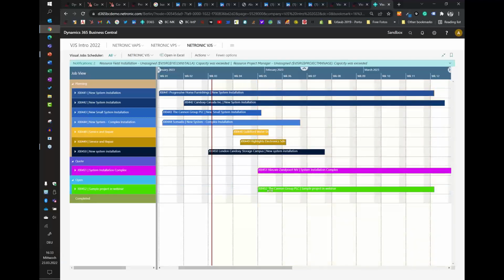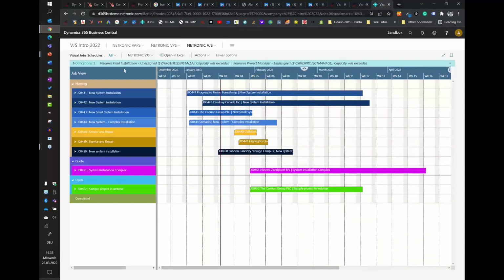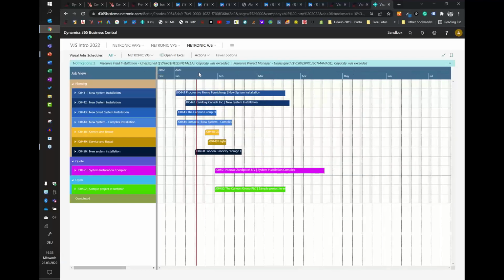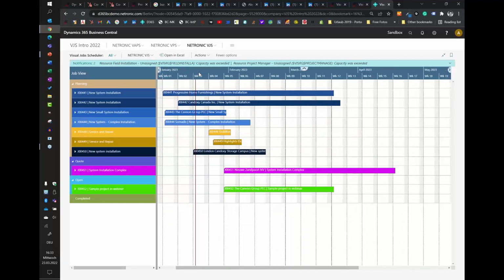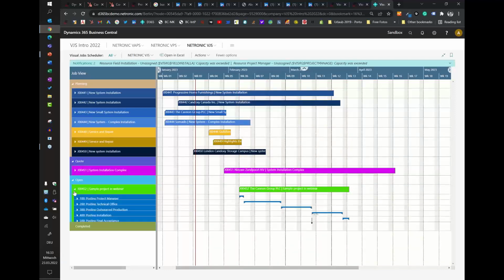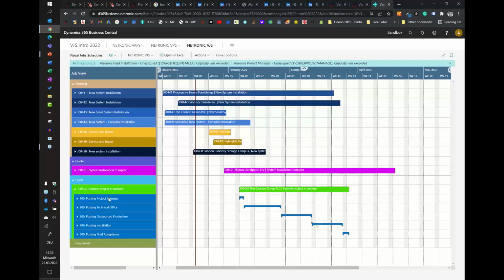So I want to start this project in week 5, and I see, okay, I might have some issues here with my project management capabilities and with my field guys, but for the time being I ignore this notification, or maybe I say, okay, let's start to be on the safe side. Let's start on week 6. What happens? Okay, still the same, but anyway, I need to work on this project again a bit more. So I look at the project structure. It is very simple. I need a project manager, technical office, outsource production, installation, field acceptance.